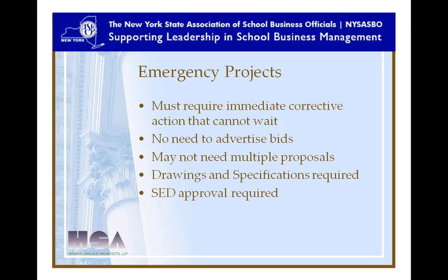You never want to do roofing, especially hot tar roofing, hot asphalt roofing, when there's students in the building. So we thought we could get another year out of it. Come the fall, we realized the rubber EPDM roof had deteriorated so much we couldn't even patch it. And so we did an emergency replacement of that roof, and SED was cooperative there.